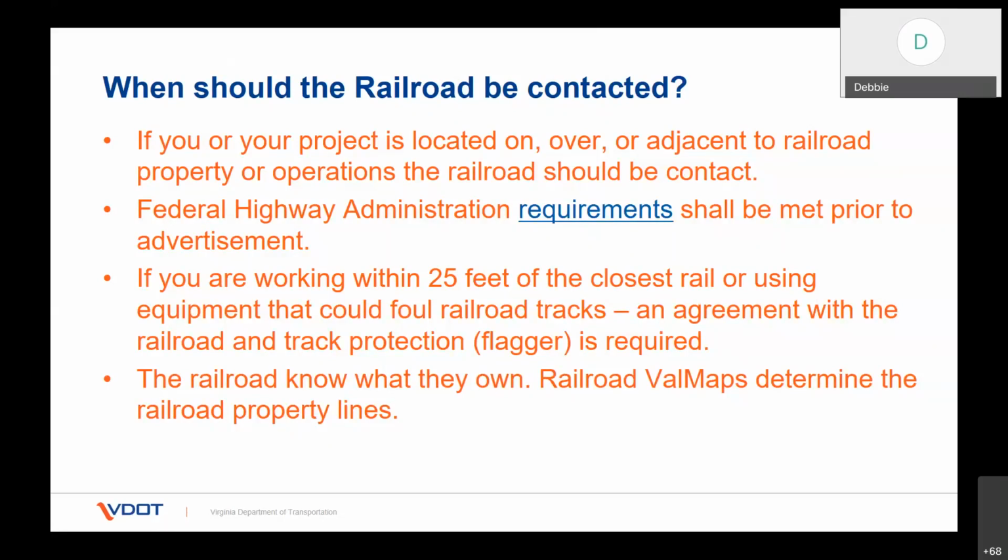Know what they own. Railroads have railroad boundary maps, which show all their property lines across our state. The railroads also don't mind sharing them with you if you have a project with them.